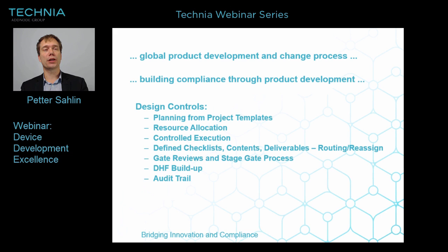As mentioned, for the deliverables, whatever is defined as design input, design output, or anything related in the DHF is automatically typed. So whenever the deliverable is stored, it's also making a trace within the DHF. So someone, for example, from quality assurance who is interested in the progress of a project or the progress of product development can at any point in time review the DHF rather than trying to understand the status in the bill of material or the status from the drawings or the 3D models. So this means that we have an automatic audit trail, and this has the same format as any audit trail on the documentation, on any part changes or bill of material changes. So it's easy to track and follow.